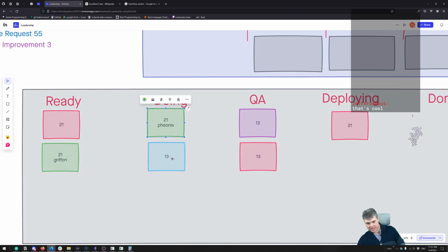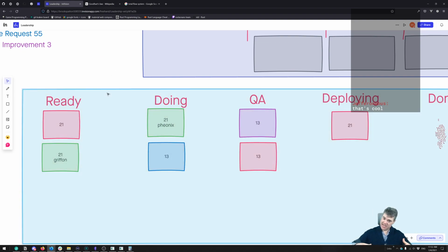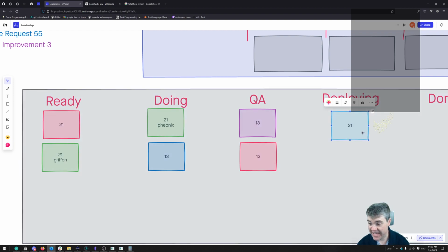Only these three are value adding. So these three should be the ones that go towards predicting how many sprints it's going to take. This is waste. This is not helpful at all. It's really just fixing bugs or repairing value where it should be. And in that case, we should not count this towards our velocity when it comes to predicting, because it's not going to happen. This is just something else entirely.